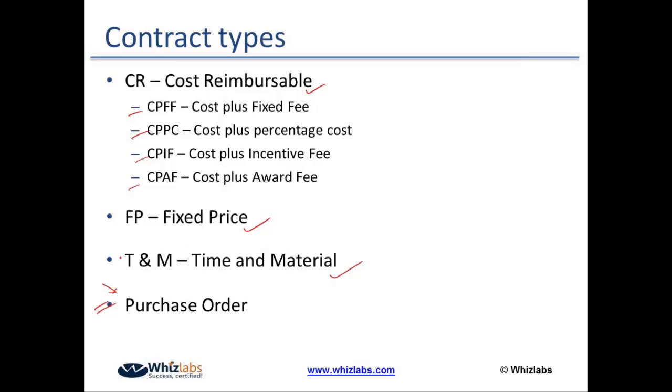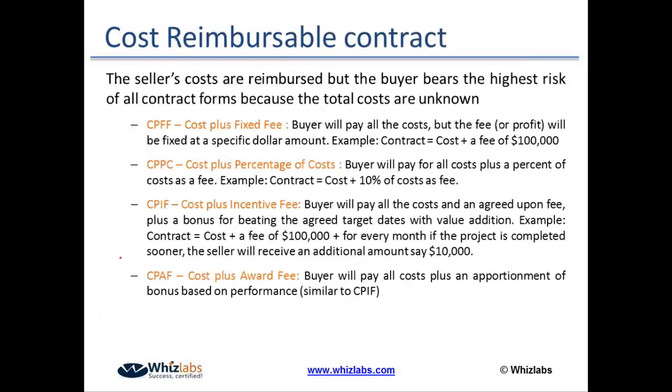Because the role of the project manager varies depending on the type of the contract, we have to take a quick look into different types of contracts. First of all, cost reimbursable contract. As the name suggests, in a cost reimbursable contract, the seller's costs are reimbursed and the buyer bears the highest risk of all contract types.